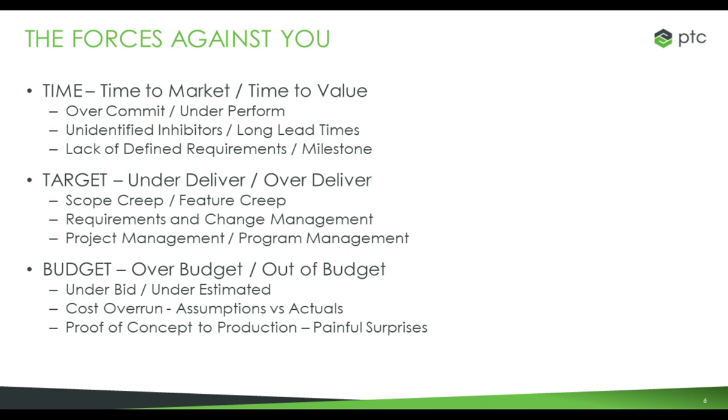And then project management and program management. I'm a true believer these are two separate disciplines, and we'll talk a little bit more about this, but with project management, you can have multiple project managers on a project, and we'll go into the depths and complexity of a project, but you can have multiple project managers doing different phases within a project or different areas of expertise, managing those sub-projects, but you really want a program manager doing the overarching high level from beginning to end of the product, and that's really the person that's driving common communication across all business lines.